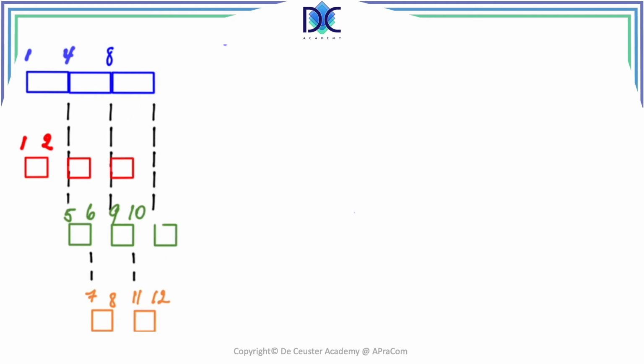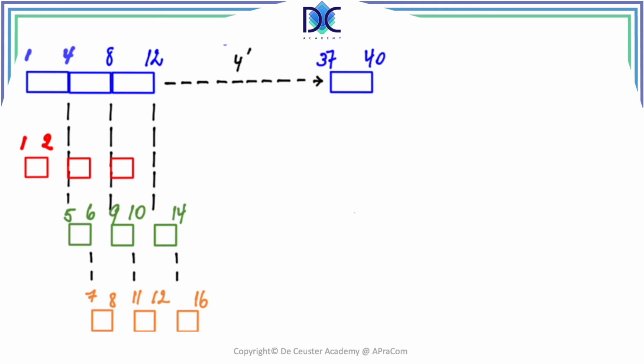Now we do the same thing here. We find the same numbers here. The third frame is finished after 12 minutes. The wheels are added after 14 minutes, and the bicycle is completely finished at minute 16. And we continue that until we reach the last frame. And the last frame is started on minute 37 and finishes at minute 40.